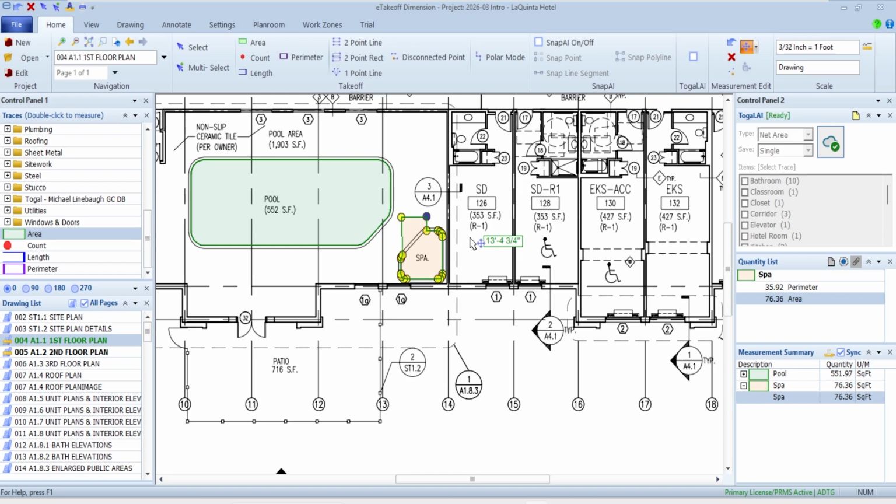There are also some things in your estimating database that don't make sense to bring over. That's why they use a utility, so you can cherry pick what items you'd actually want to quantify. When you think about something like a superintendent or a tool trailer, I can't really calculate the superintendent months off an image. Some items just don't make sense to clutter up your list in eTakeoff. So let's get started.